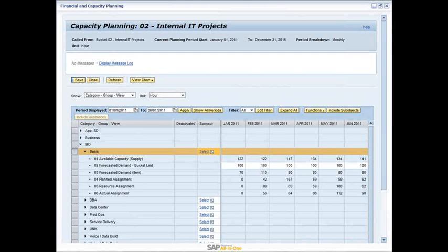And the views below that are grayed out, which means they're aggregating up from the item below. So when you're doing your very early level planning with your portfolio item, you have a forecast demand. And this is before you know if it's going to be a project. You just want to throw some numbers in there to start consuming some demand and to see what it looks like. You just use a forecast demand field for that. You can throw the numbers in very, very quickly.